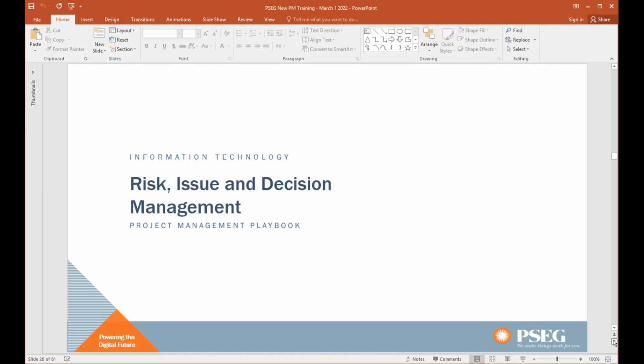Don't try to think that, okay, I'm adopting all these things as far as the project management process team is concerned, but I completely ignore the security team. Nope, that's not going to happen, because down the line on the third phase, if they find that you have not complied with their reviews, then most probably the project may enter into red state. So don't do that one.